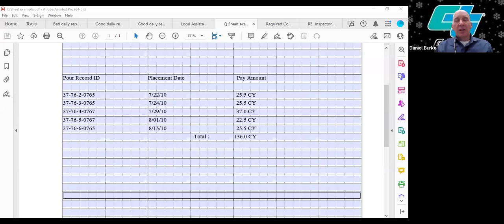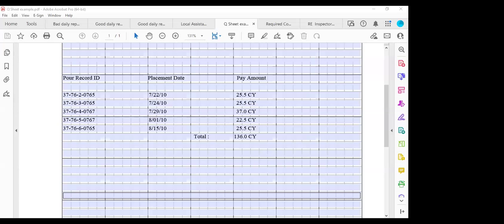So the second question, does the resident engineer have to use the LAPM Exhibit 16C2 every day, or is it every working day? Yeah, that is a good question. As we said, the inspector's report has to be done daily. For the resident engineer, in our manual LAPM, we have indicated daily or depending on the size of the project. On smaller projects, it can be done weekly even.